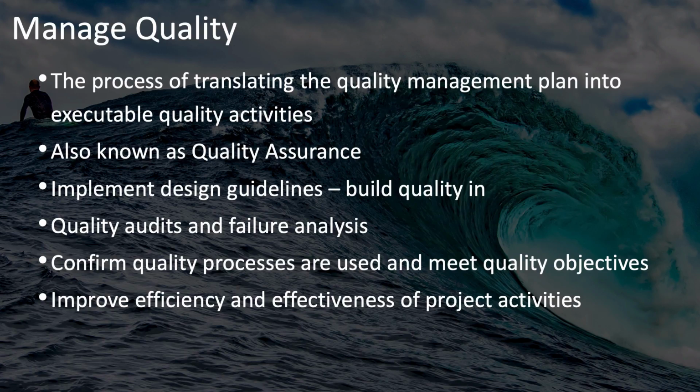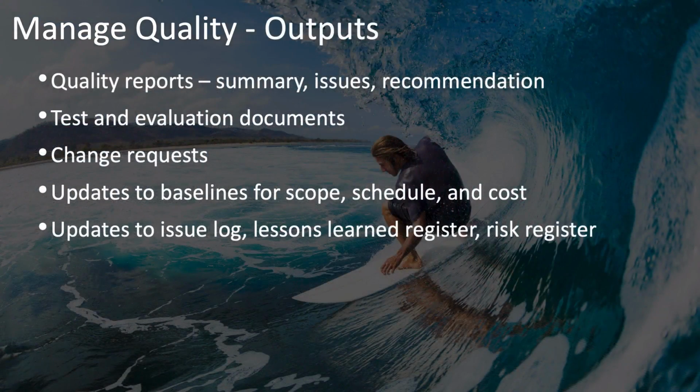Manage quality performs quality audits and failure analysis. It confirms that your quality processes are being used and that these processes meet your quality objectives, and helps you to improve the efficiency and effectiveness of your project activities. The main outputs of manage quality are the quality reports and the test and evaluation documents.